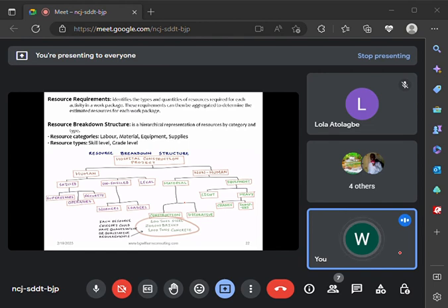If you look at that particular project, please do a detailed WBS. If you can achieve a detailed WBS, it becomes easy for you to do your resource. It becomes easy for you to do your costing. It becomes easy for you to do your scheduling and also easy for you to do your risk. That is the essence behind your WBS. All right? So take note of that.